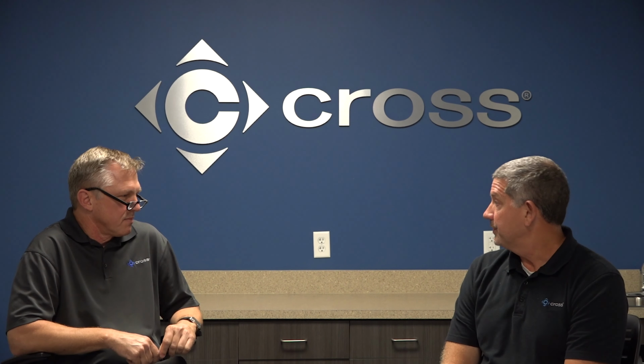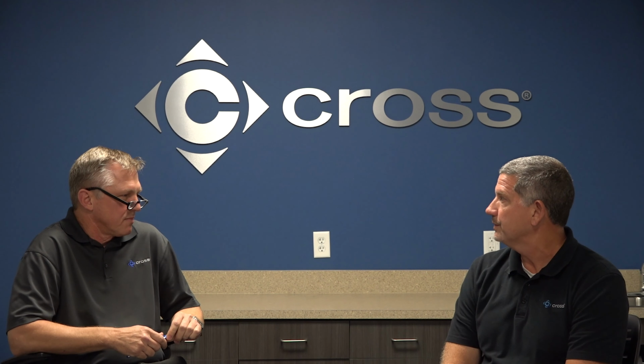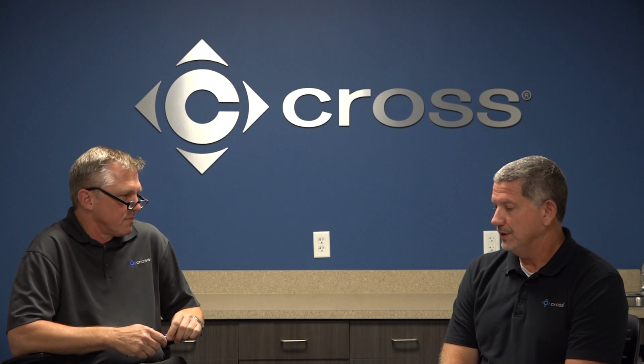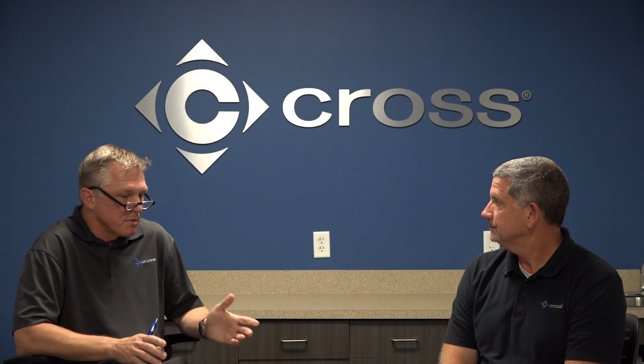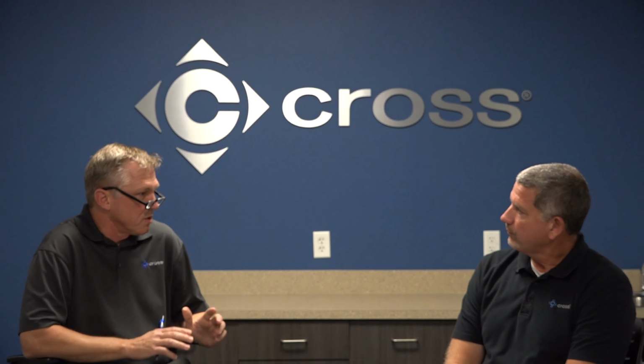Yes, we'll give them an action item list of what we have as a high priority. What we mean by high priority is that it will not operate to protect their tanks. Then we let them categorize how they want to go about achieving that list, so they can get the necessary equipment on site. We're able to give them that information. We also can, if the device is obsolete, give them sizing information so we can provide the replacements for them.